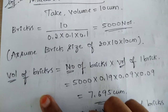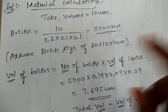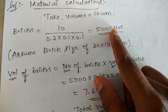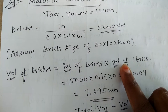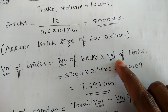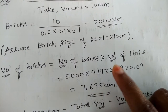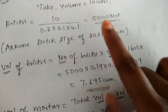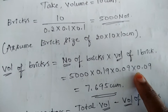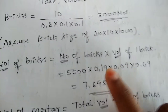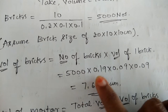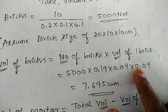Now let us find the volume of bricks. The volume of bricks will be found out by multiplying the number of bricks with the volume of one brick. Here, while considering the volume, we have to take the nominal size of the brick. The nominal size of the brick is 19 by 9 by 9 centimeter. This standard size includes the mortar thickness, but the nominal size does not include the mortar. On converting to meters, the size of the brick is 0.19 by 0.09 by 0.09.